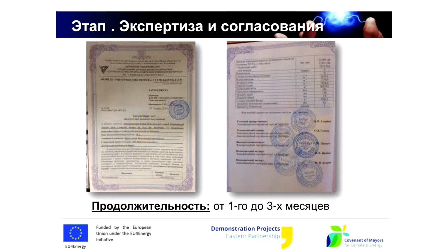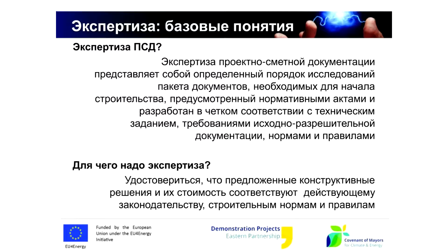So after you finish the technical design and bill of quantities, after you've verified it with us, after you have finally selected the set of measures that are going to be implemented, we get to the examination stage. So what is meant by examination? This is scientific verification by special organizations regarding meeting all the construction norms and requirements, solutions, etc.